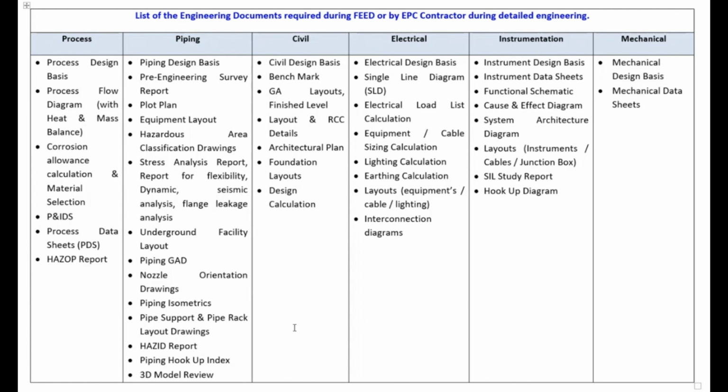If you talk to me at site, a pre-engineering survey is carried out by the FEED consultant or the contractor. Okay, I will not repeat every time FEED consultant or contractor; you consider both of them together. So what we do first is we start our engineering survey. The engineering survey is the first activity. It is written in the heading of piping, no doubt in that.